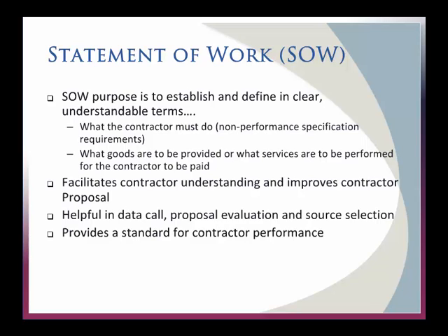And no doubt you've already maybe even done some work on it with writing statements of work. Just government to government, we write statements of work. But this is used to establish clear, understandable terms: what the contractor is going to do, what if anything's going to be provided to them. It's all got to be put in writing. We got to know what facilities are going to be involved. You got to put all this stuff in writing, and it provides a standard for contractor performance. So while the statement of work isn't the contract itself, it's a very key part of it.